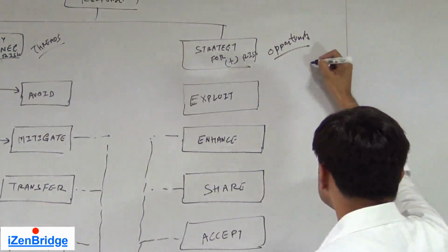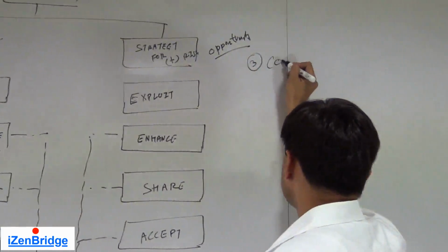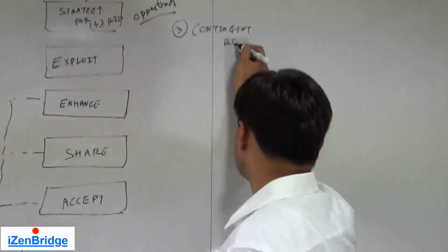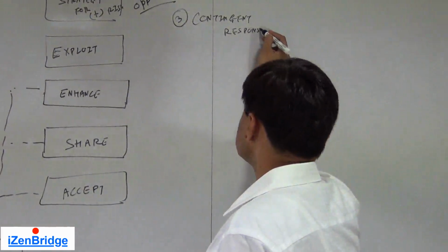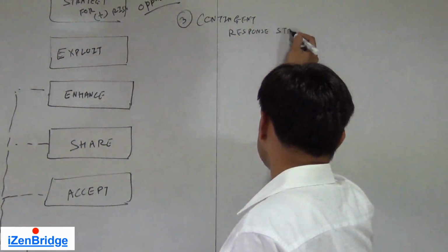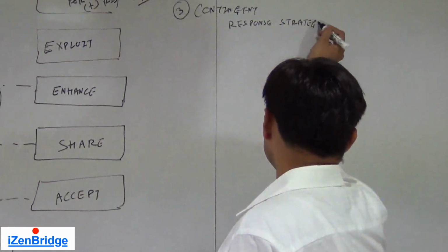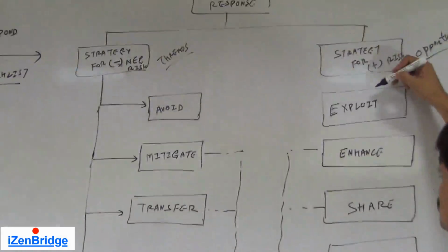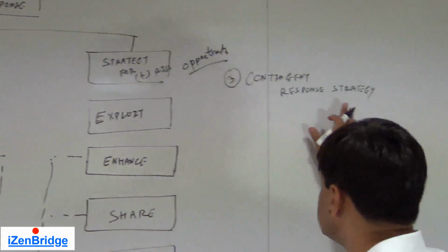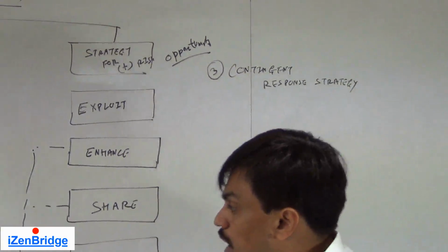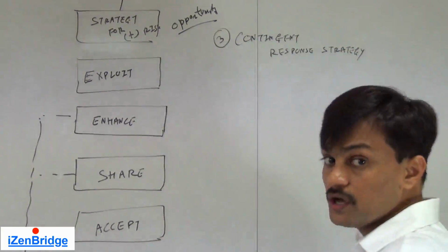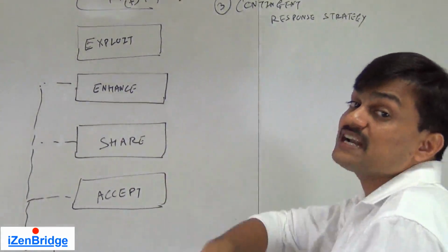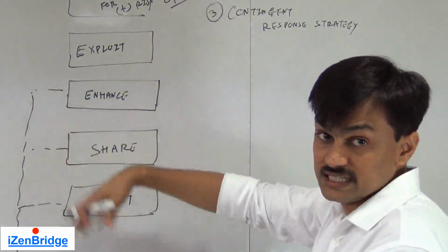So this is the third tool and technique, contingent response strategy. Now, we had strategies for negative risk, strategies for positive risk, then contingent response strategy: a strategy which we need to handle for the residual risks. We may put an amount of money and time along with the activities, or at a control account or at the WBS level, to take care of all these risky things.